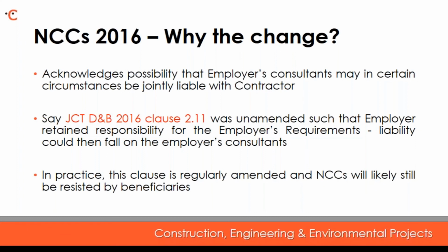The regular amendment that I referred to previously, what you really end up with is a position where the contractor accepts a single point of responsibility for both the design and the construction. And then as many of you will know again, design consultants will be novated to the contractor, and responsibility for the employer's requirements will also be passed over from the employer to the contractor.